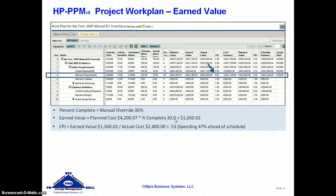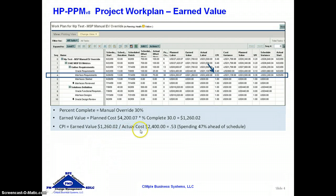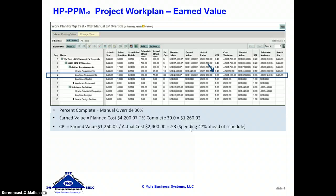The next element is the Cost Performance Index (CPI). This is an attempt to determine how far we are off from our plan. It is the earned value of $1,260 divided by the actual cost of $2,400, giving a CPI of 0.53. This means we are 47% ahead of spending, which is not a good thing. Keep in mind that for these indices, the closer to 1 they are the more on track you are — the further below 1, the bigger your variance and potential problems.